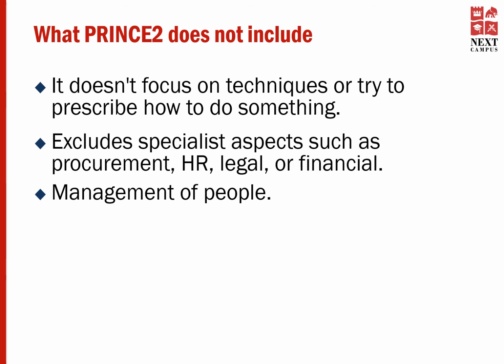Prince2 also excludes specialist aspects such as procurement, HR, legal, or financial areas. The reason for this is that by defining approaches in these areas, the method would no longer be generic and applicable to all project environments.